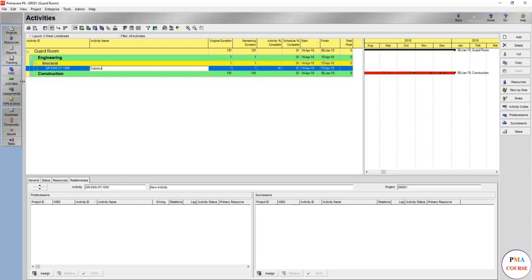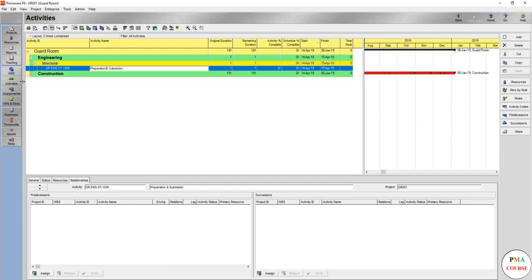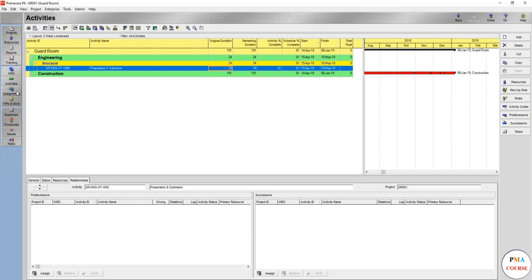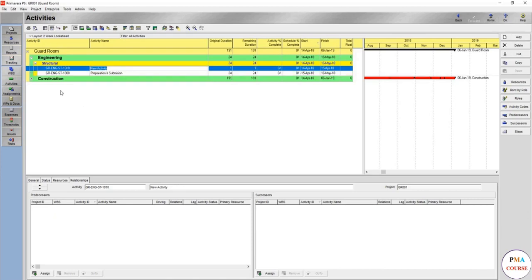We'll make submission, which is preparation and submission. We can name it, which is done by the main contractor as you, and submission, or by subcontractor. So we will give this 24 days, which is too much by the way - it can be done way less - but we will give this 24 working days.